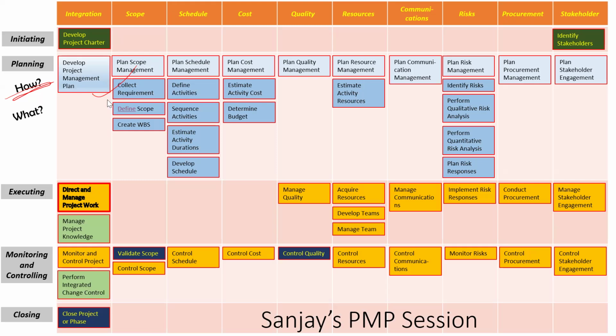Now remember, after you collect the requirements, you can't decide the strategy. How will I prioritize? Listen to this very carefully. Should you first decide how you are going to prioritize, or should you first collect the requirements? Collect the requirements. But you will prioritize them later, correct, Swati? After collecting requirements, you will prioritize. But what should be your approach? Whether we should call them high, medium, low, or 1, 2, 3, or essential, nice to have, good. This strategy should always come first, Swati, correct?